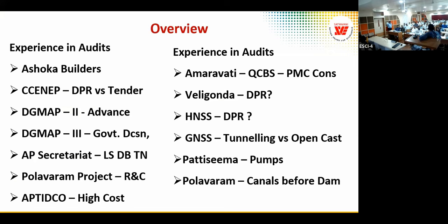That's all. So you have 6 lakh acres or 10 lakh hectares, put the DPR cost and float tender without any DPR. And all of them lasted for 20 years, projects not completed still. And we audited them to find where it went wrong. We found that it is the DPR: ambiguous DPR, inadequate DPR, incomplete DPR. You can't call it a DPR actually. In fact, I reported that.